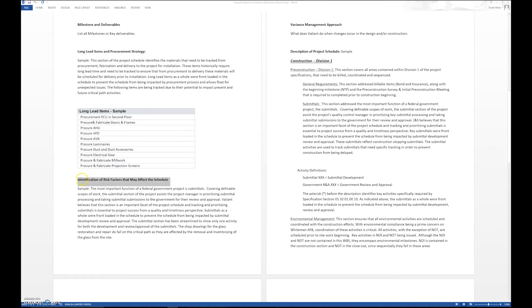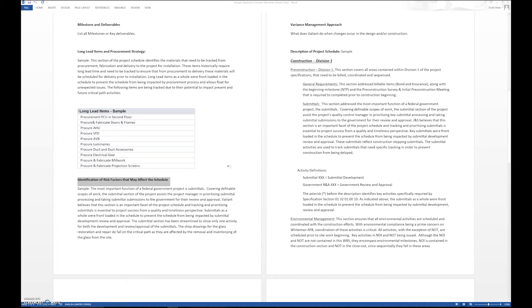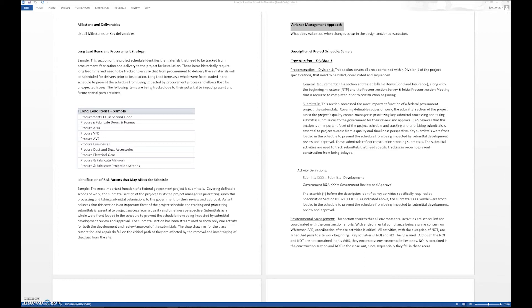The next item is we're going to identify risk factors. What are the risks that we're going to have to deal with, to contend with throughout the project that can affect cost and, more importantly, time? Variance management approach: how do we deal with the fact that things are going to occur? Who has the authority to approve different change orders in time? What is the management approach? What's the standard operating procedure?